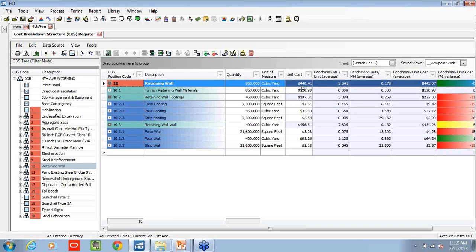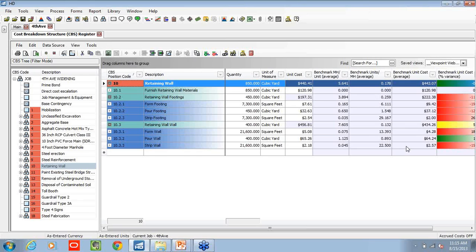Right now we're at 440 a cubic yard, and based on our benchmark values, the average has been 443. So we're right in line. There's some differences between the details of that retaining wall, particularly in the footings. So maybe one job is a little more complex or a little simpler. But overall, we're right in line with where we should be.